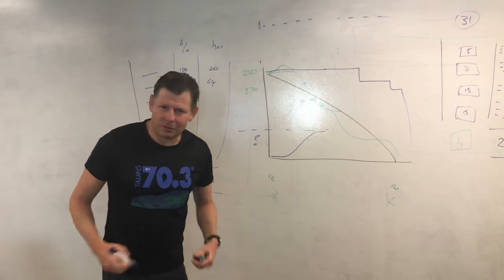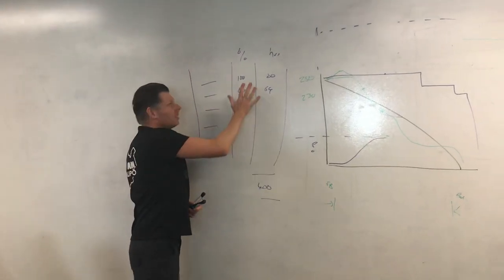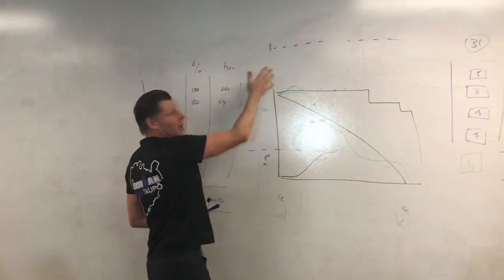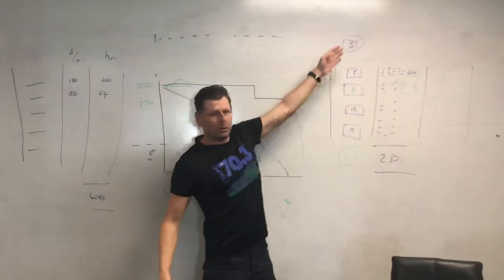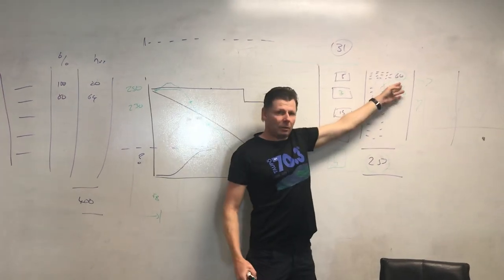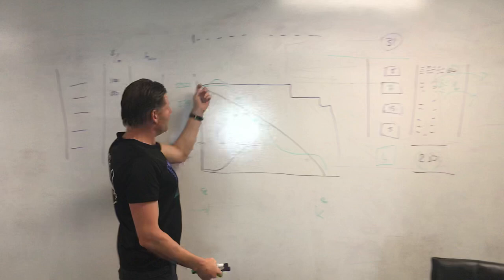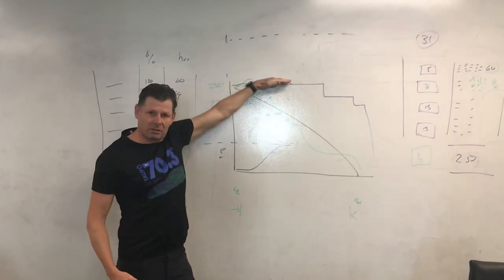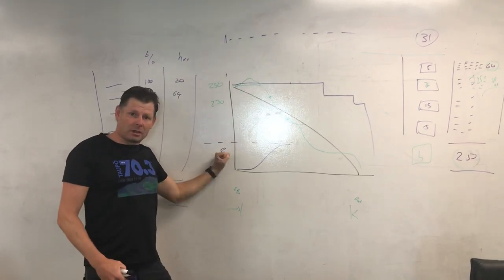This is a quite comprehensive Agile nudge, isn't it? So, high level. In sprint planning, always set capacity as well as velocity. Go for the theoretical maximum of 8 hours a day per person. When you pull in the stories, you use empiricism to pull in the user story points. Then you use the hours when you task it out to cross-check with that. Then you use the hours in the burn-down chart to see how you progress. You can always use burn-up charts as well if you like, and I recommend using them.